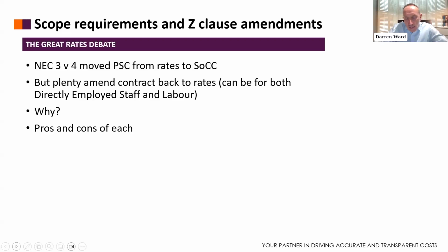So as Ian mentioned, with the move from NEC3 to NEC4 we moved the PSC from rates to schedule of cost components. And in the last 3 or 4 years, I've been involved in audits on many NEC4 contracts where this has moved back to rates as an amendment. And that can be for both staff that are directly employed or labour.